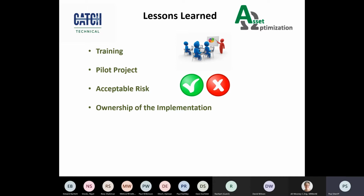And we believe that a better approach, when contractors are inevitably required, is to use the contractors to execute the more day-to-day duties of the inspection team. This enables one or two key company inspectors or engineers to be involved in the project implementation. And using this approach, you then get commitment and ownership from the start of the project, and it means that the project is sustained once we've left the site.